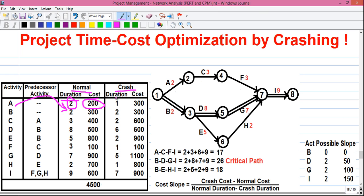Next is crash duration and crash cost. The crash duration represents the minimum time an activity can be completed with extra resources or extra money. Activity A can be completed in 1 day instead of 2 days, but at an increased cost of 300 rupees per day — compared to 100 rupees per day normally. Although we can reduce activity duration, the project cost will increase. We have to calculate the optimum project duration and cost where we reduce duration with the least increase in cost.